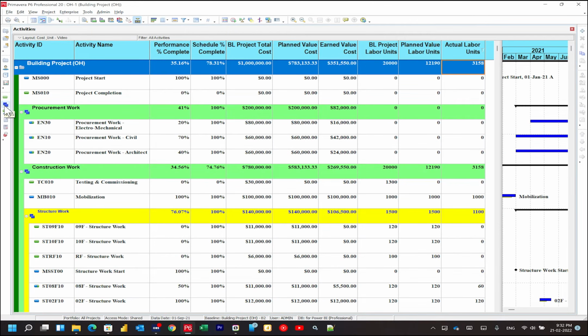Our strategy will be, after making the periodical update on Primavera, we will export Excel file contains the budget and updated data with specific data like we discussed before. We will store the file in fixed location with fixed file name, so we can use the refresh method in our Power BI or Excel report without editing the report, as we will discuss later.